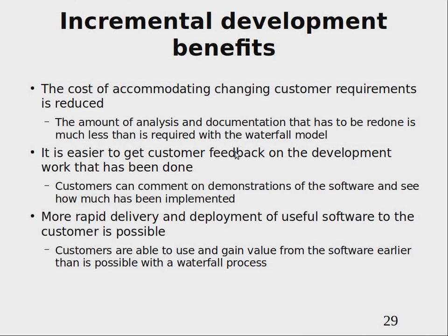But the bad thing for any incremental or iterative approach is that you need to check your progress against the previous phase or iteration, to show that you are making progress. If you do not check for this, it's very easy to get busy and go into an infinite loop.